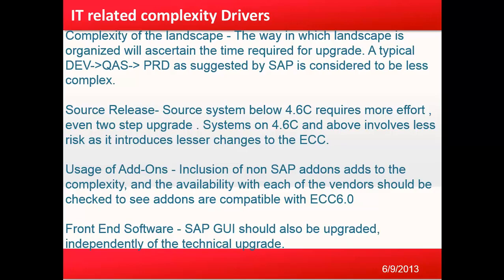The usage of add-ons is another factor — inclusion of non-SAP add-ons adds to the complexity. Each of the vendor add-ons should be checked to ensure they are compatible with ECC. We need to review each add-on in the system and make sure it is compatible with the new release. Additionally, the SAP GUI front-end software should also be upgraded independently of the technical upgrade.